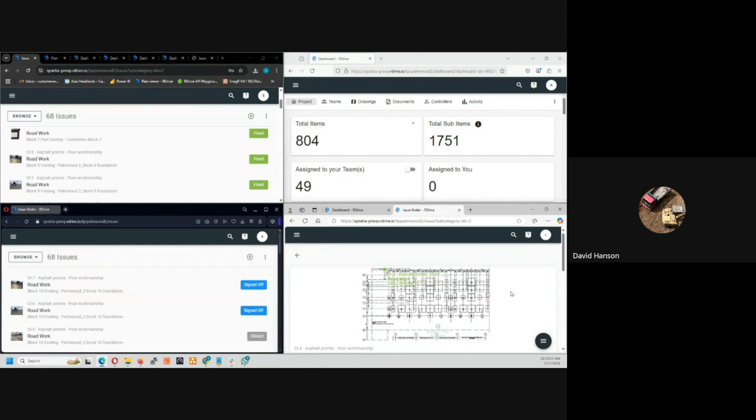Keeping those 20 inspections or RFIs in draft mode is a reminder to me that I need to complete and submit them to the person doing the inspection this week. The person doing the inspection isn't going to see your 20 drafts until those drafts are converted into submitted or opened, and then the workflow gets enforced.